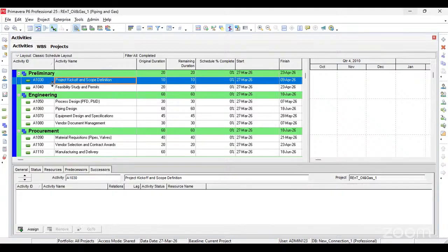You don't just pick random successors. After you secure your land, you purchase your land, what are you going to do next? Maybe you do survey, yeah, you do survey. After that, you clear. The next thing, probably the architectural drawing and all of that.